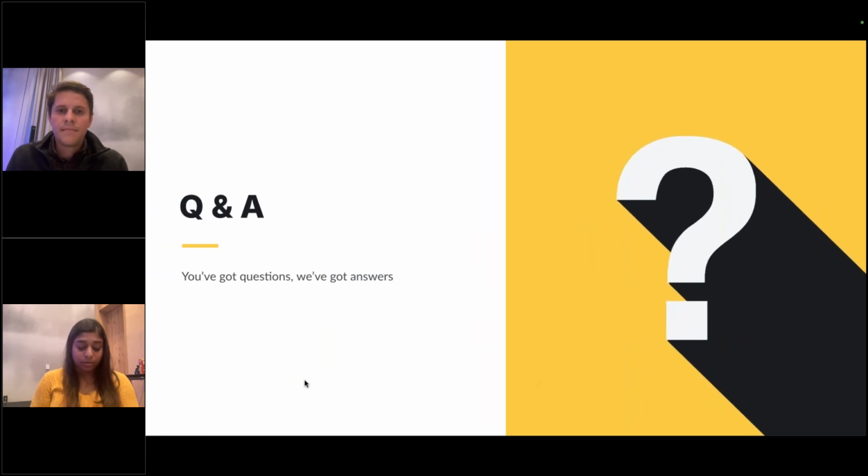Great question. And the answer is definitely yes. Because you've created a category for prefabricated items, you're able to really quickly generate a task report that's just filtered for that prefab category. When you create a detailed task report, all you need to do is make it so that it's delivered once a week, and Fieldwire will go through all those tasks that you've created on your project and find those prefabrication categorized items, and you can have that automatically sent out.